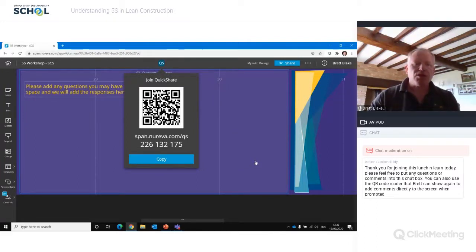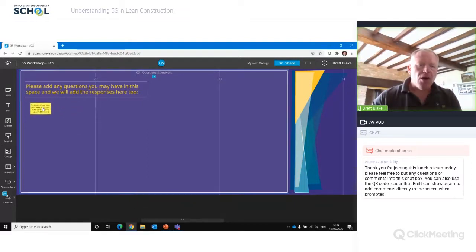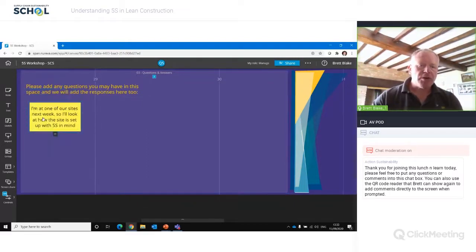So one of the questions I'm often asked within 5S is, where do we start? Well, what I tend to do is I have a go look-see on my sites and I understand where some of the biggest issues are first. I'll talk to the people on site and ask them what their frustrations are. If it's around material storage, utilisation of equipment or finding the right equipment, that's usually a good starting point. You may find that the organisation around the entrances and exits of your sites, or where materials are being delivered, could be choke points as well. So sometimes that's a good place to start.